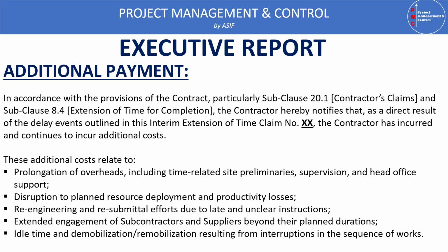office expenses or overhead, disruption to plan, resource deployment, and productivity losses, re-engineering and resubmittal effort due to the late and unclear instructions, extended engagement of subcontractors and suppliers beyond their planned duration, idle time and demobilization and remobilization of resources resulting from the interruption in the sequence of the work.